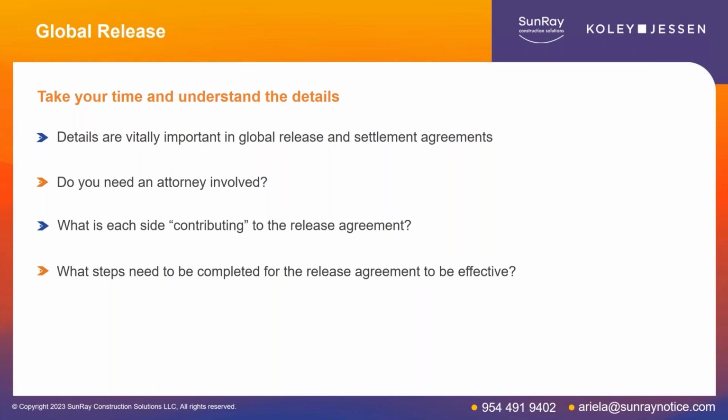And so you need to make sure that you fully understand what it is that you're getting in exchange for releasing the lien and what you're giving up as part of the document. And consistent with my commentary earlier about the document needing to essentially create a timeline, what's really important is to have the document baked out so that you know that you're going to get paid within 3 business days of full execution of the agreement.